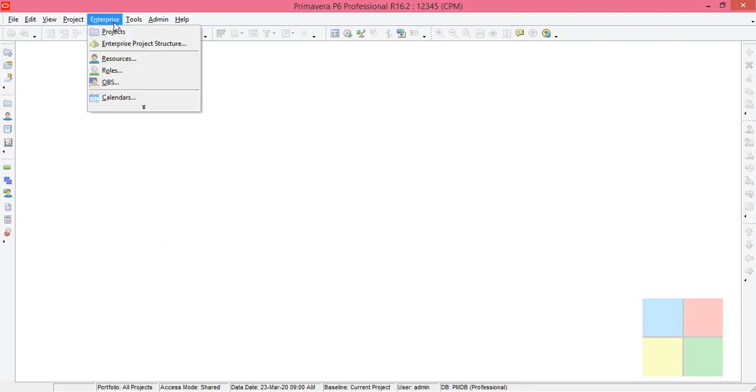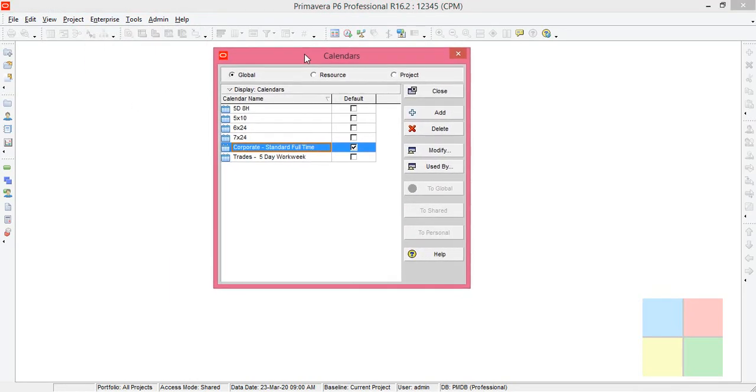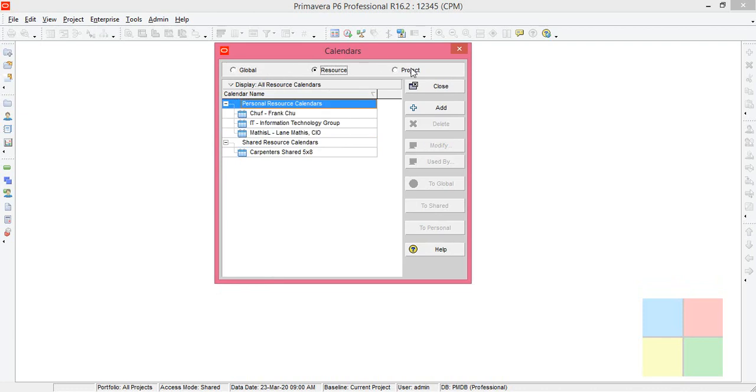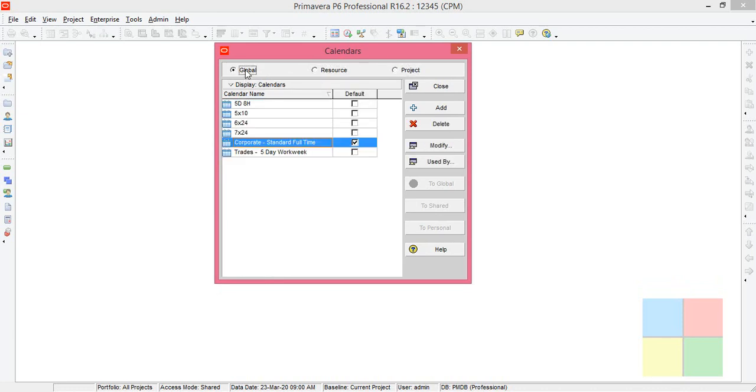Calendar. You will get this kind of dialog box where you can see three radio buttons here: Global, Resource, and Project. Always keep it in Global because calendars that you create under Global will be available everywhere.